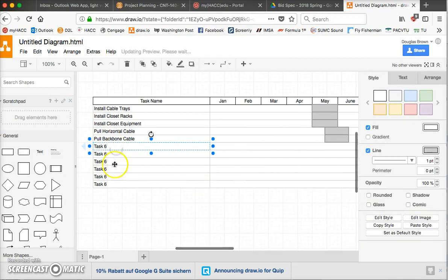Obviously, finish this through, get your tasks in here. Again, I'm interested in the task, thinking through the kinds of things that we talked about. Installing the cabling, terminating the user end, terminating the patch panel, testing the cabling, troubleshooting the cabling, certifying the cabling, that kind of thing. So get those in there.